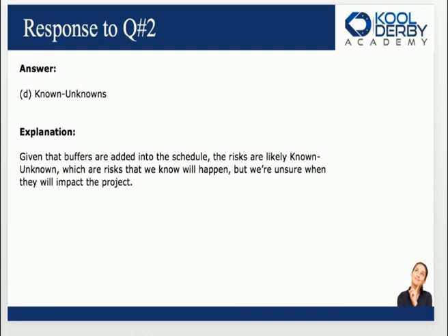Think about a risk like a budget thing. Maybe we know that the budget can be cut, or maybe we have a risk of poor weather. We're working in the Northeast, and the project is a 2-year project that is going to go in the hard winters of the Northeast. Well, you know to add the buffers because it's going to be tough to meet certain deadlines when the weather is so poor, so inclement that we can't do the work. I think you understand where I'm coming from.